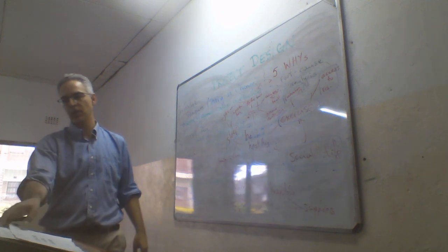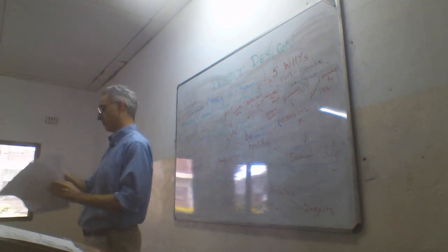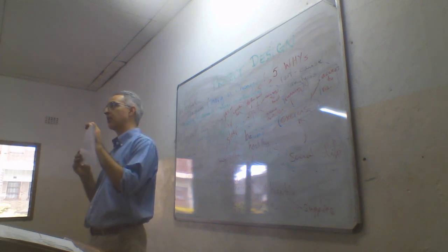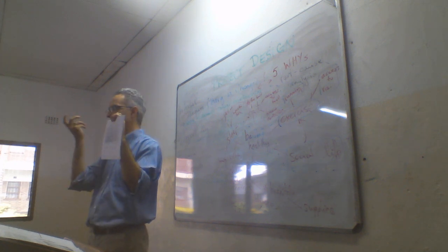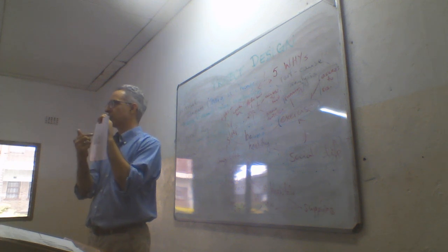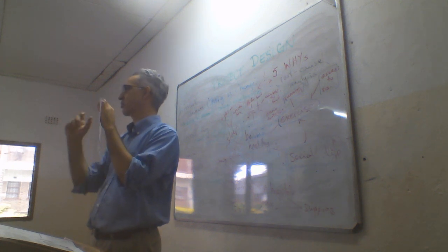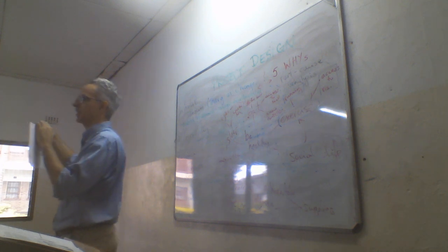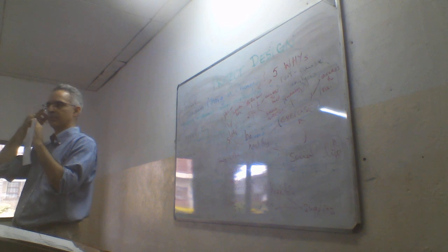So the last piece, the logical framework, is basically this. But now with numbers, we actually need to do some assessment. What is the result I want with the change? Today there are 10 wells. At the end of the project, we want 100.